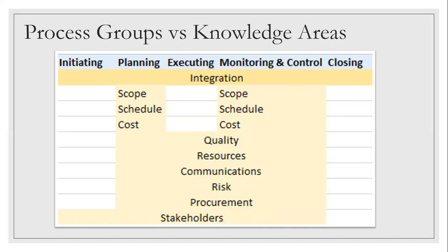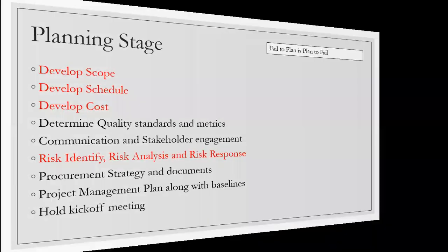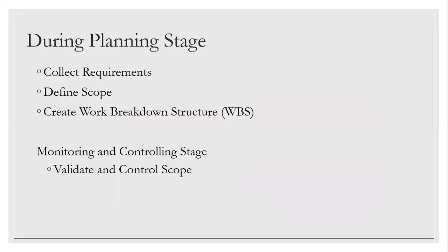If a change request comes from a stakeholder during execution, it has to go to the change control board. In the monitoring and control section, scope, schedule, and cost appear again — they are monitored. If there's any variance, the impact is assessed: are we meeting scope, working as per schedule, working within cost? That's checked in monitoring and control, but in execution we just work as per the plan.